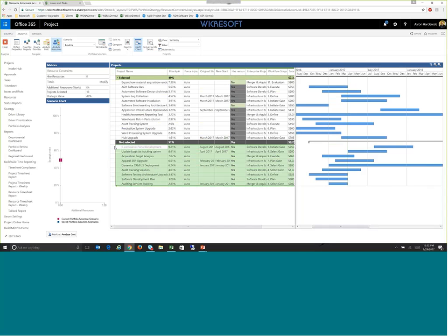Okay? And again, very quickly, in a nutshell, what I can do here is, utilizing the Gantt here, I can move some of these around. That scope change may have thrown that project out of the mix. Well, what if I defer some of these other projects here temporarily, or put them on hold, move them down a little bit, so I don't have all of this overlap of projects going on here. So there's a lot of what-if analysis you can do.